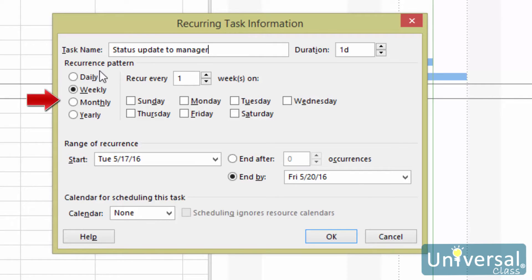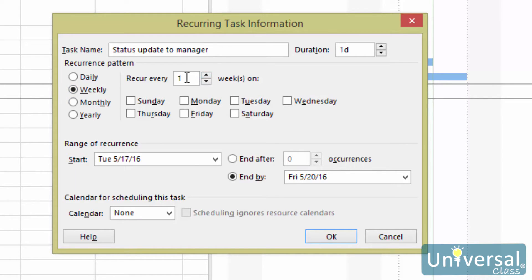The pattern you select will determine the options that you see. For weekly occurrences, you will choose if you want it to recur every week, every two weeks, every three weeks, and so on. Then you can choose the day of the recurrence.